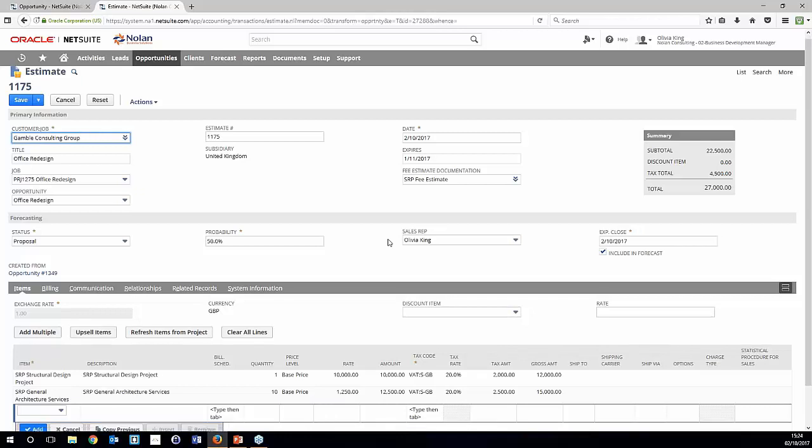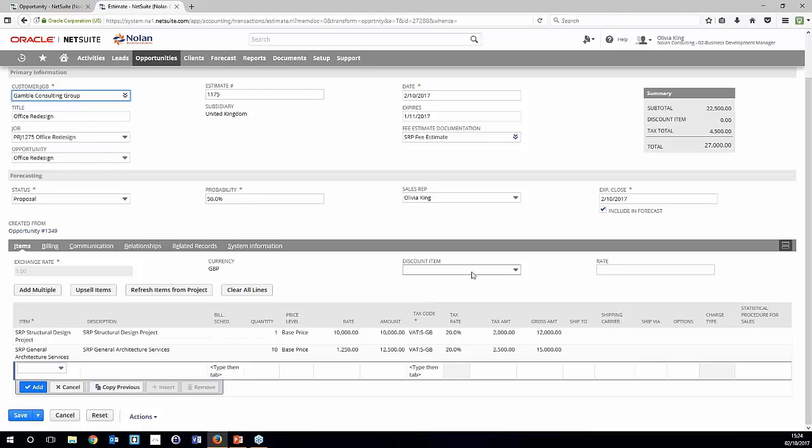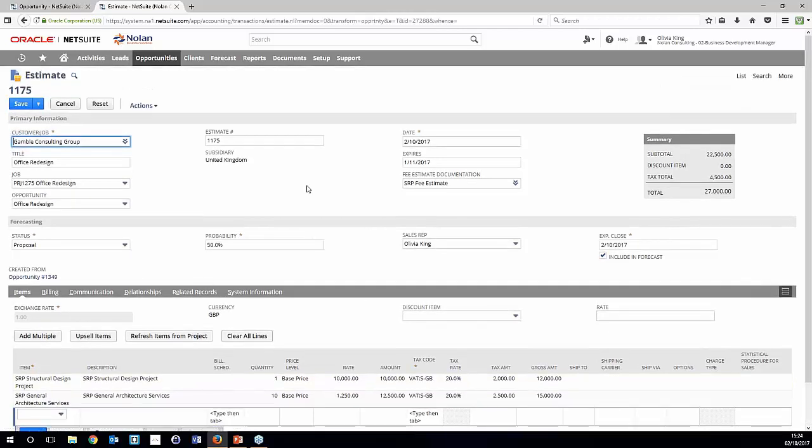And again, what we've got is a slightly different form here that opens it up to advanced billing. So we can see our billing schedules now have arrived down here. We can either dictate the billing schedule based on the order as a whole or as individual line items. So for example, if this needs to be split over 12 months, over 3 months, say 50% up front, you can pretty much entirely customize the billing schedule to how you want it to work.